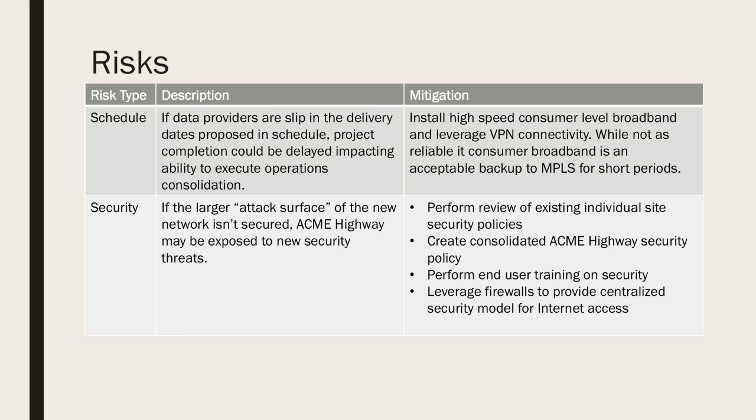That's a very good point. We need to call that out, and I'll update the risk register. I'll call that out as a risk. There is knowledge transfer in there, but as we know, knowledge transfer isn't enough to mitigate that risk. I need to think of a way to validate the success of that knowledge transfer, and I'll give that some thought and get back to you.